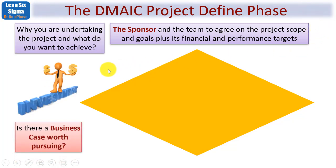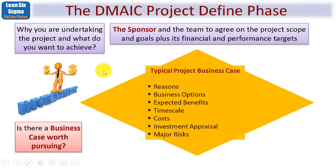One of the first important questions to ask is: is there a business case worth pursuing? Any organization will almost certainly have a rich source of potential projects, but which ones do you run first? All projects are accompanied by their own business case, and the business case answers: why are we doing this, is it justified? This normally includes metrics such as benefits, costs, risk, as well as an investment appraisal using financial metrics to determine if the project is worth pursuing.